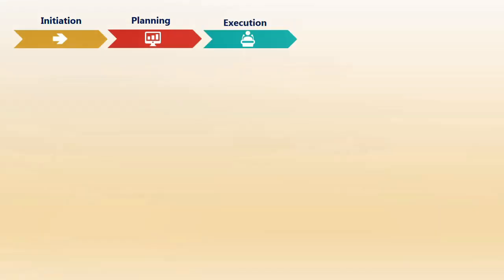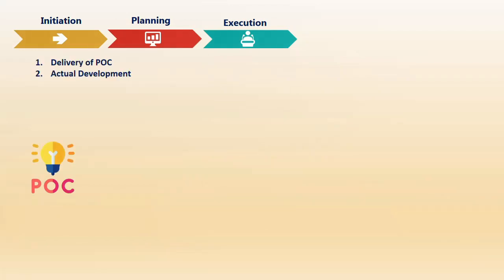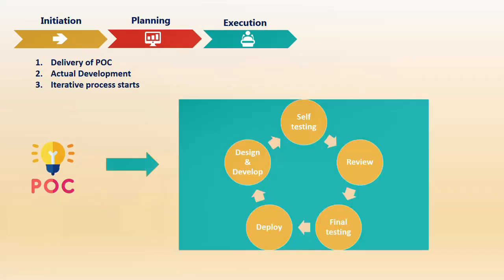The next phase is execution, where the development phase starts. First, if a POC is required, you deliver it, then actual development starts. Actual development is an iterative process, meaning it goes in a circle. You won't build the entire solution in one go—that never happens in any typical project. You do everything step by step, stage by stage. First, you design and develop a single task, then self-test it.